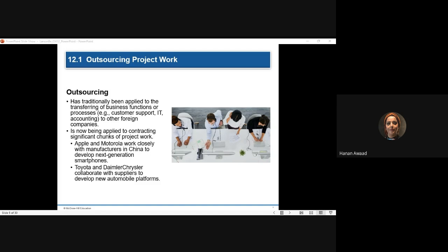They decided, no, we will outsource it. For example, they might have tents. Shall we buy the tents, use them for the fair for a couple of days, and then store them, and maybe use them in 6 months or so? No, they decided they will rent them. So these are some of the decisions as a project manager you might think of.